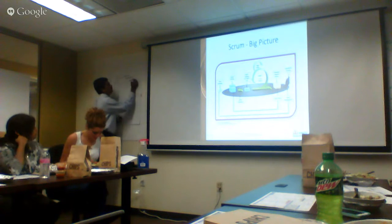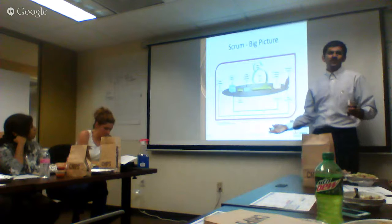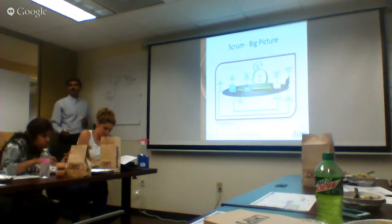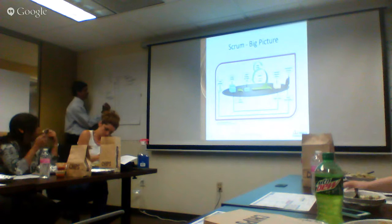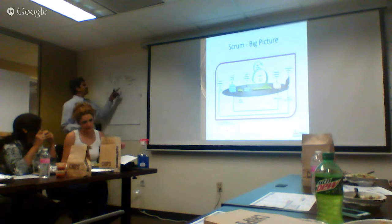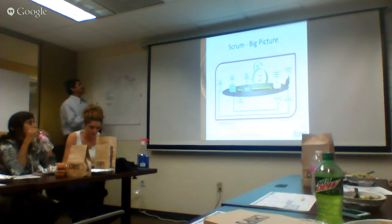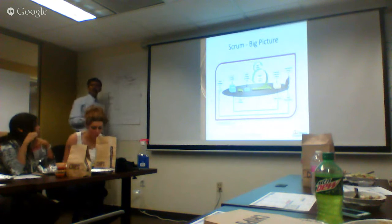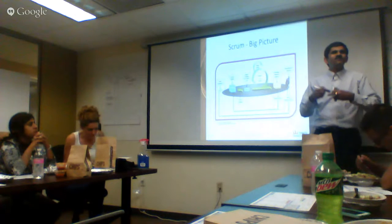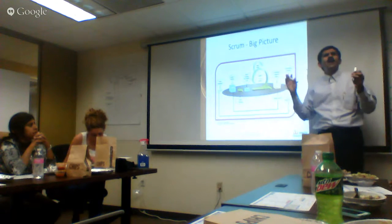That's the what. Then in the sprint planning meeting, we do the second thing, which is how we're going to do that. Who helps with the how portion? The developers, BA, testers, those people make it work. They help actualize what the product owner wants in the goal. So in sprint planning, they decide what we're going to do and how. In the traditional way, we prepare a project management plan and work breakdown structure ahead of time. Here, for the first sprint, we don't yet know what we're going to do and how we're going to handle it.